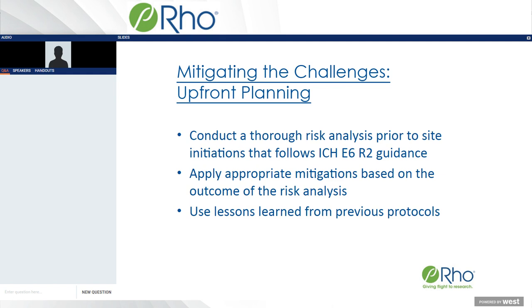and identify what really matters and what data is important and critical for the submission. Because as Ben mentioned before, part of the goal here is to get the submission successfully submitted and approved by the FDA. So this starts in the whole planning phase before the protocol is even finalized. Once you've identified those critical data points, those processes, you then want to do an analysis and then identify any risks that you might encounter to those critical data points or to those processes that could be an impediment to a successful project. Once you identify those risks, you will be able to evaluate those.